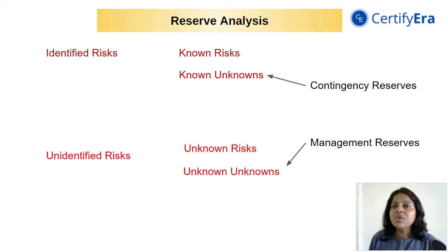At regular intervals in the project life cycle, it is recommended that the project management team revisit these reserves, that is contingency reserves and management reserves, and consider revising them so as to effectively manage the risks. Sometimes they might have planned some management reserves of a few dollars, but in the next risk management meeting, they might feel that this amount might not be enough to effectively manage the risk at the project level. So they might try to revise the management reserves.